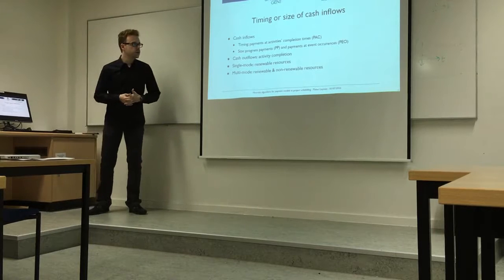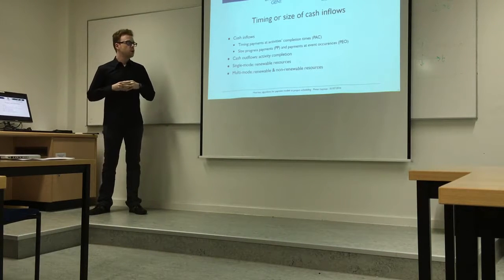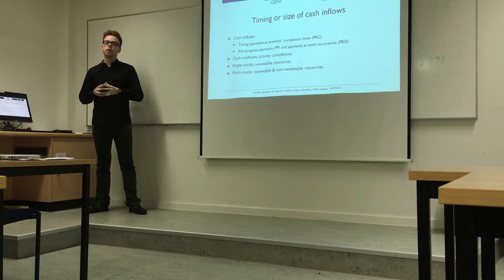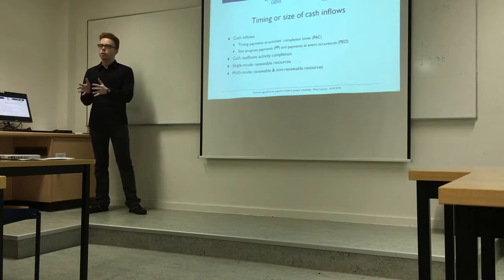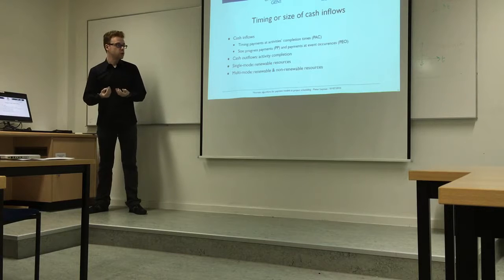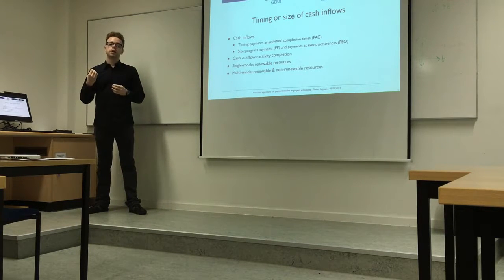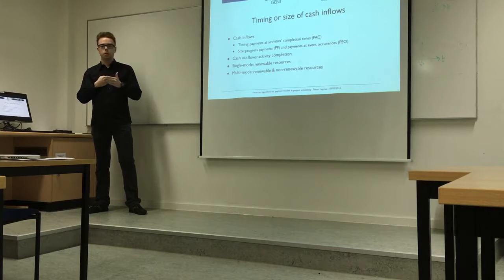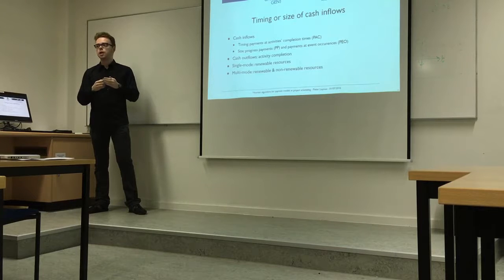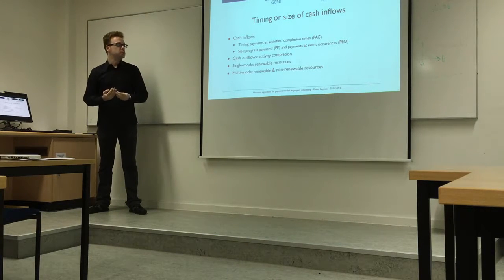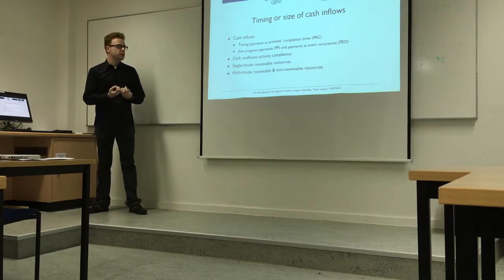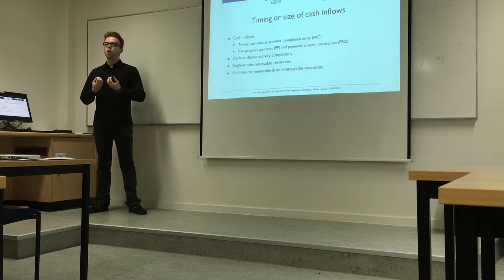So far I've been talking about the timing of cash flows. What if you also consider the size? Instead of a pre-assigned cash flow per activity, assume only cash outflows assigned to each activity — essentially only costs. The cash inflows are then determined by progress payments: for example, after 5, 10, 15 weeks you receive cash inflows based on work done since the previous payment. The question again becomes how to schedule activities to cope with this.